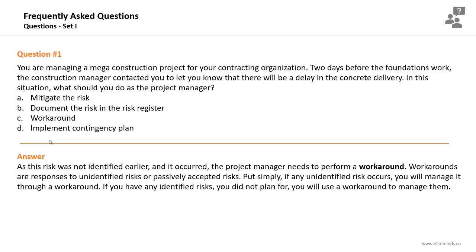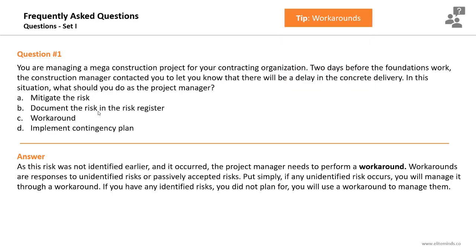As the risk was not identified earlier and it occurred, the project manager should perform a workaround. Workarounds are responses to unidentified risks or risks that were passively accepted. One of the risk response strategies is acceptance, which can be passive or active. Simply put: if any unidentified risk occurs, manage it through a workaround. If you have identified risks you did not plan for, also use a workaround. The keyword here is 'there will be a delay' — it's a fact, an issue. Options A, B, and D are invalid; the only valid option is workaround.